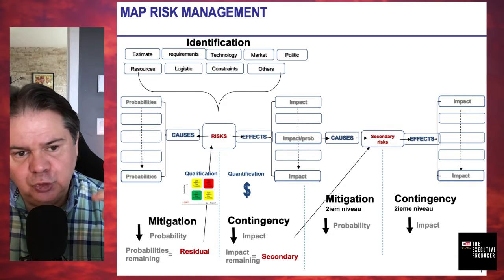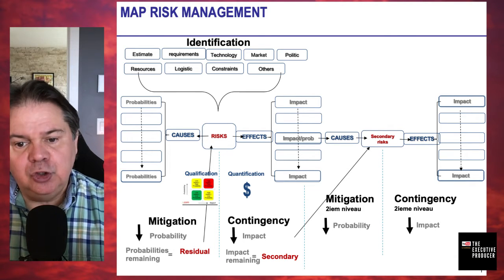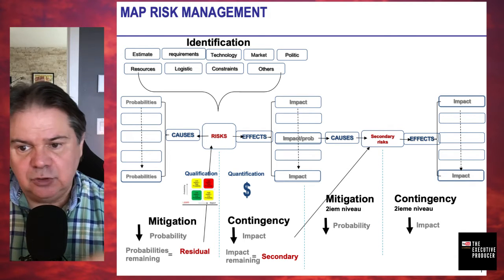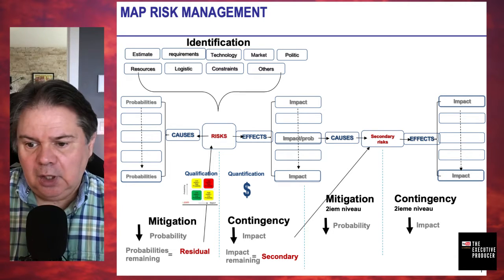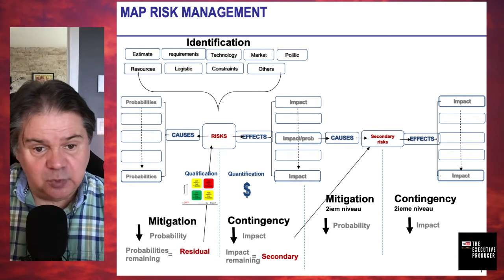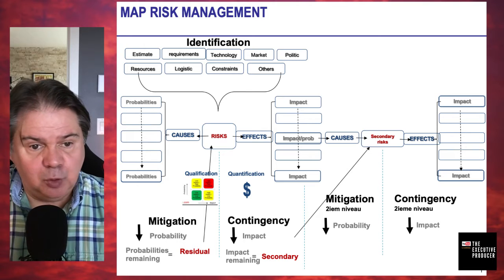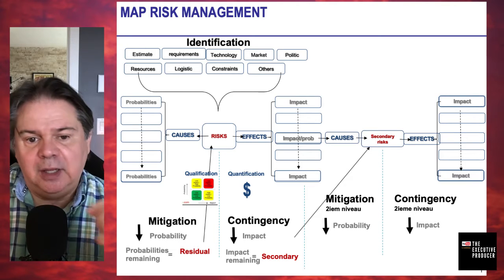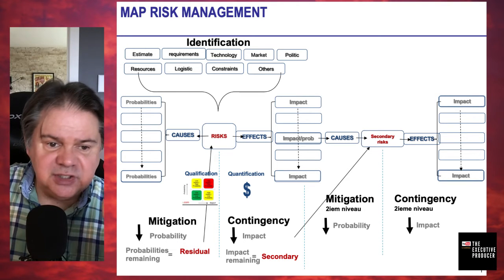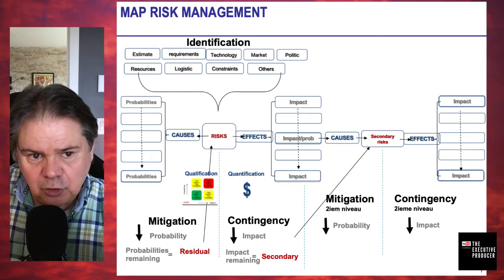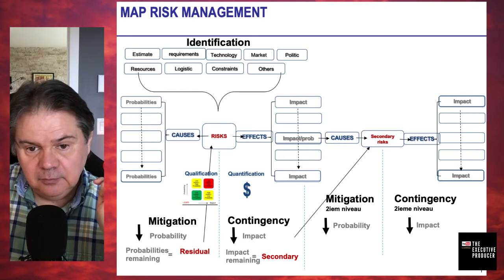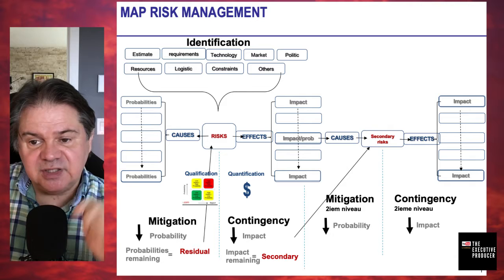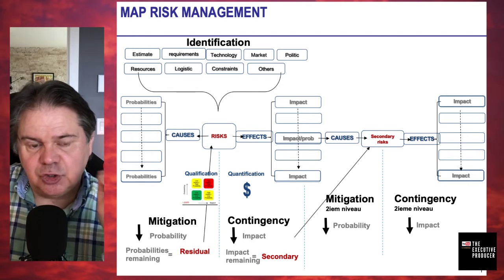Anything that is high probability and high consequence — we need to do something about that. Different combinations help you rapidly position all your risks and make decisions. To do this you enter these risks into what we call a risk register, which will be the topic of another video. That register generates the color-coded qualification — yellow, red, green — the matrix that rapidly allows you to position your risks and make decisions.